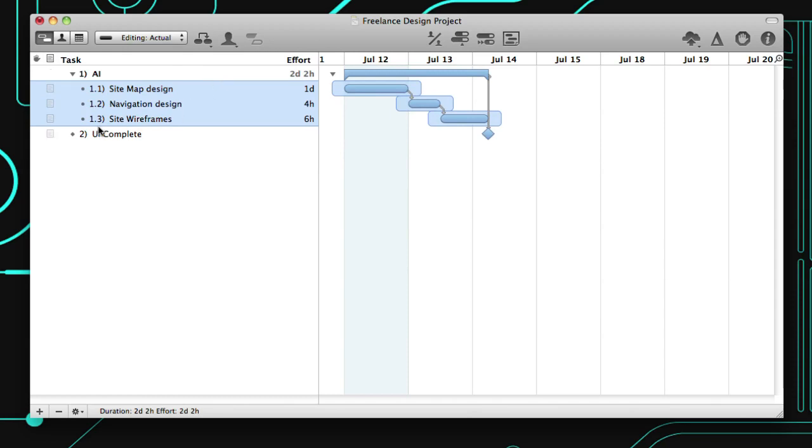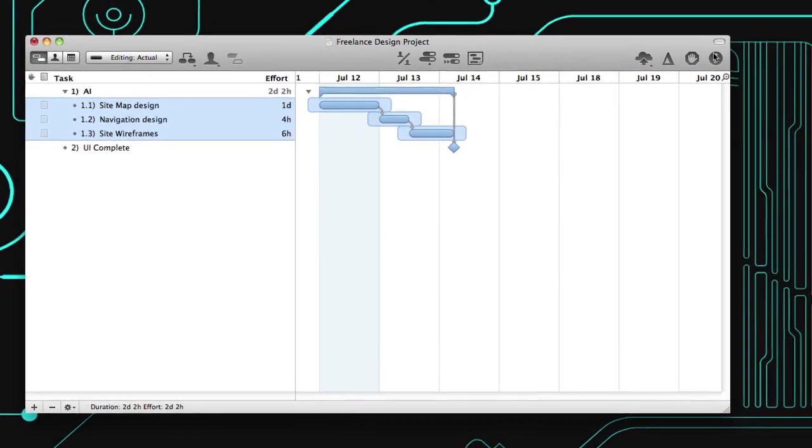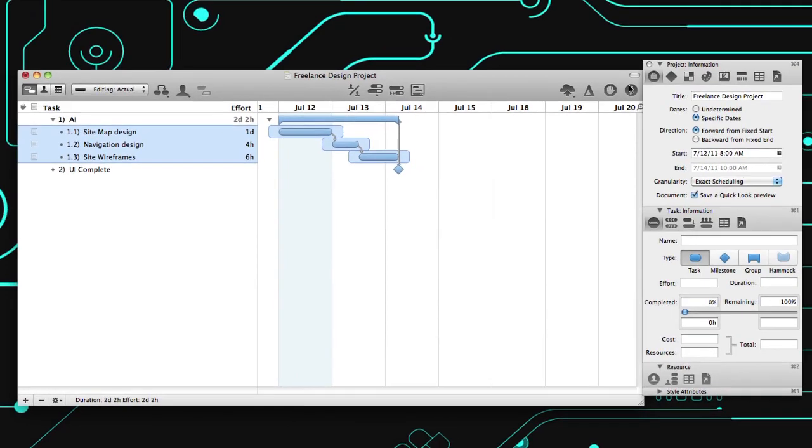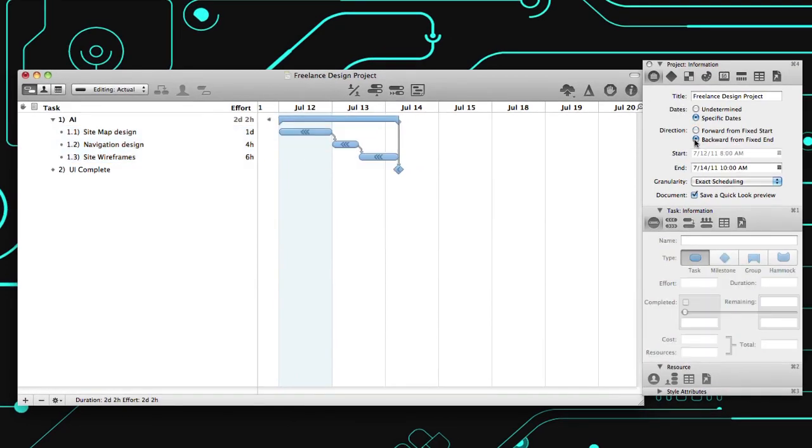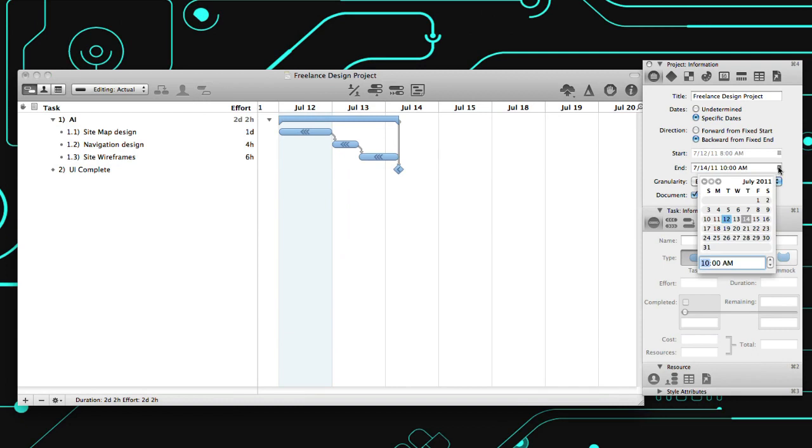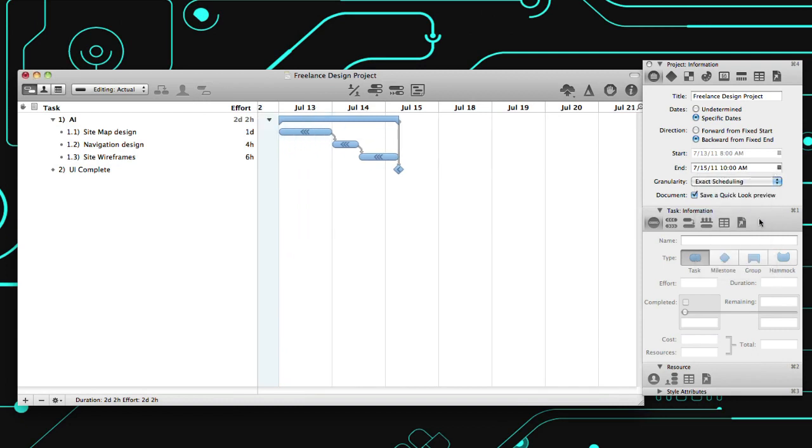If you know the project kickoff or launch dates, use the Project Information Inspector to plan forward or backward from a fixed start or end date. Each tab within the Inspector helps you to assemble all the crucial details.